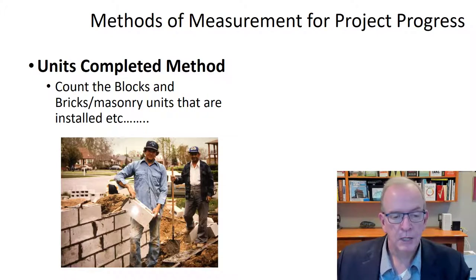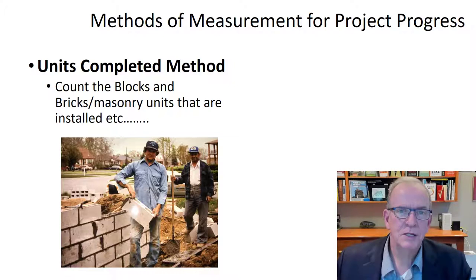So you can measure units this way, blocks. You could also measure it by surface area, so you could say square meters of block that's been installed. Usually with something like blocks or bricks, it's pretty easy to do it by the units themselves. And then you get used to how many blocks somebody should be able to lay in a day, etc. So it gives you that idea. Lots of stories with this porch when I was 20, but anyways.